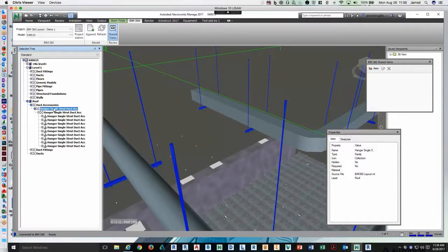In this case, I'm going to be showing what it looks like in Navisworks. And then we're going to push that to BIM 360 Glue, where I can create point sets. And those point sets are valuable, and we can consider those as basically work packs. So as our foremen are assigning scopes of work for the layout crews, we can take a very visual way of assigning those points to our field teams to go lay out, and we don't have the worrisome bother of carving out CSV files or getting a USB drive that has to be transitioned from the field foreman to the layout crews on a daily basis. And we entirely do away with that.